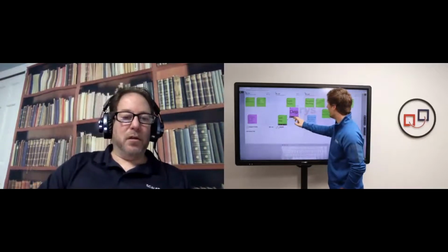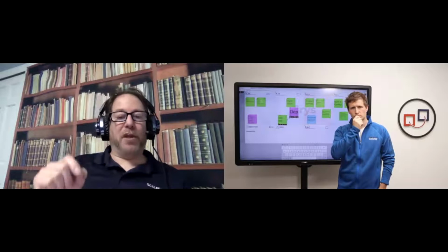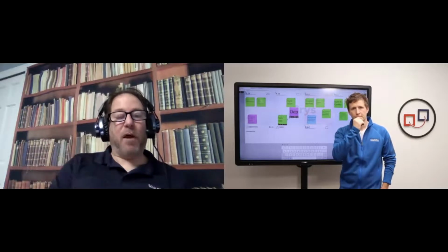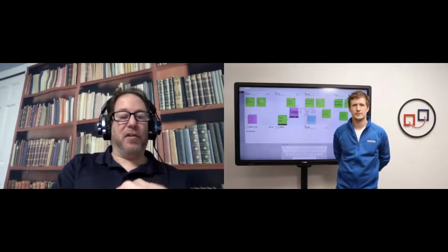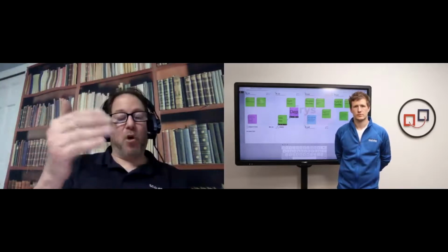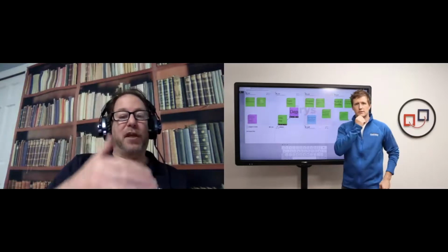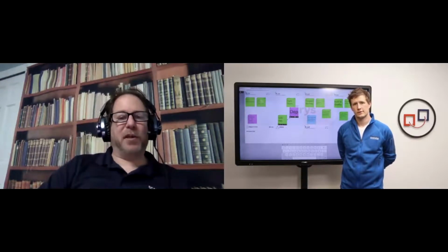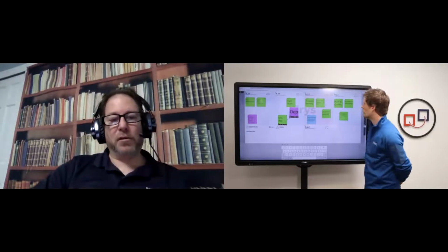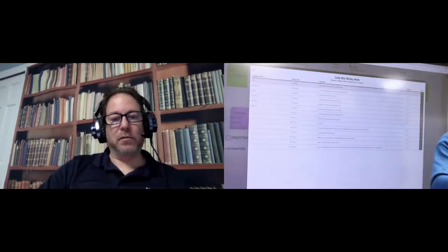And it's also important to remember that on the program board, we're only creating a dependency between features. However, flagging it on the team board helps remind us that the story still belongs to a feature. Most stories belong to a feature. They don't all have to, but we're really only interested in solving the dependencies with the features. Yeah, that's super important. But it's a reminder that you need to speak to the other team. Exactly. So you link the story solving the dependency to the right feature, which could belong to another team in that case.